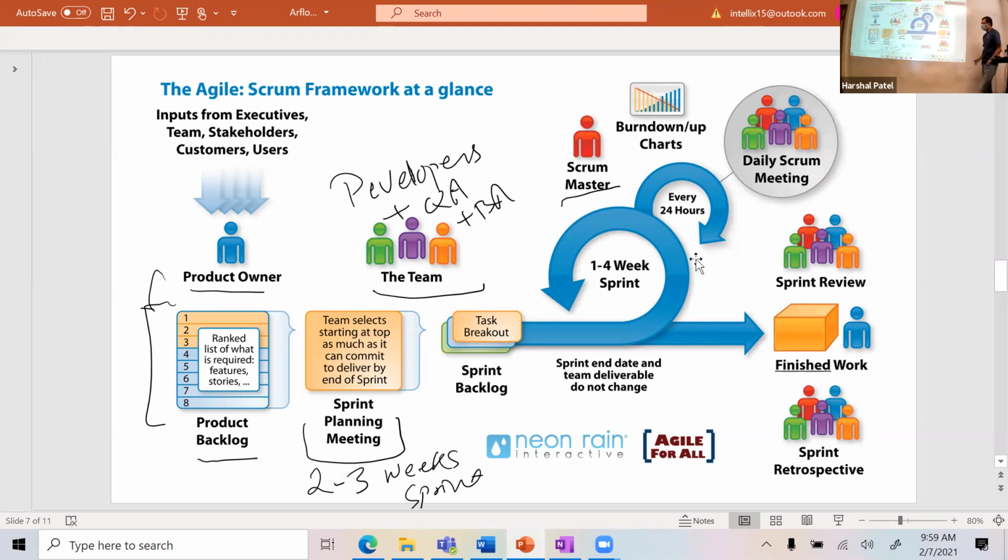Because Agile works in a 2 weeks or 3 weeks time frame, the team will pull the items they can deliver over 2 to 3 weeks. They will say, I can do the 2.1 and 2.2 requirements, we can only implement the login feature. So they will pull some of the requirements or stories from the product backlog into the sprint, which is nothing but 2 or 3 weeks, whatever you agreed on. They will discuss those items, pull them in, and start working on the tasks, basically.